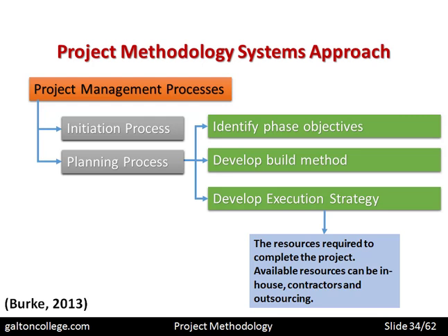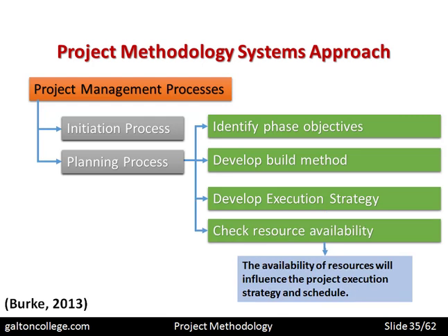The more detailed planning. Will the resources be developed in-house or will they be bought in? Are the resources available elsewhere in the market? What's more efficient? Check resource availability. The availability of resources will influence the project execution strategy and schedule. So check the availability of resources.